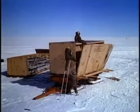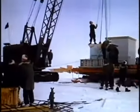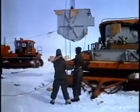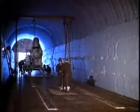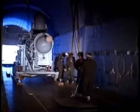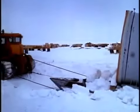Boxes of piping and wiring, each item carefully labeled, were opened so that each unit would be available when needed. Major components shipped in pieces because of weight limitations were reassembled before being moved into the trenches. The condenser, 15 tons of steel, was one of the first units to be moved into the tunnel prepared to house it. When the condenser was slowly winched forward, small track rollers supported its entire weight. Next, still mounted on its special sled, the vapor container was eased down the ramp by 3 tractors, one in front pulling and 2 in back to keep it from slipping.